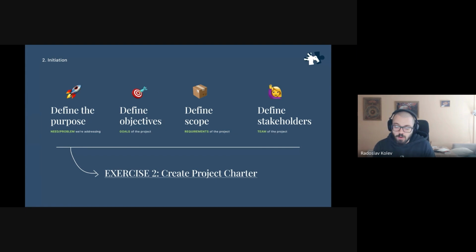Now, the project charter is very good because it's a TLDR of the project. And we all love TLDRs because we hate reading long documentation of any kind. The project charter serves a function that you can link it to anybody who's interested in the project. And in 5 to 10 minutes, they will know everything there is to know about the project on a fundamental level. Obviously, you don't use it to explain how you code a certain feature or how you design certain pixels, but it's about exactly what you want to achieve, what your goals are, and how you are going to get there.